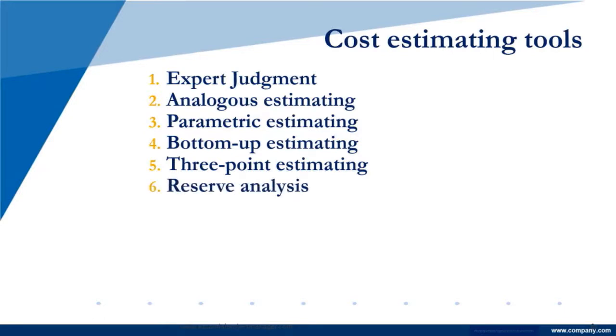The reserve analysis is specific to risk management, and we'll talk about project risk management in a later session. But we do analysis during risk where we actually put quantities onto the risk. We say how many days and how much money a risk would incur based on estimates. So risk analysis is put into this as a way of understanding we have to have the risk part of our project understood and taken into account before we move into a solid cost budget estimate.